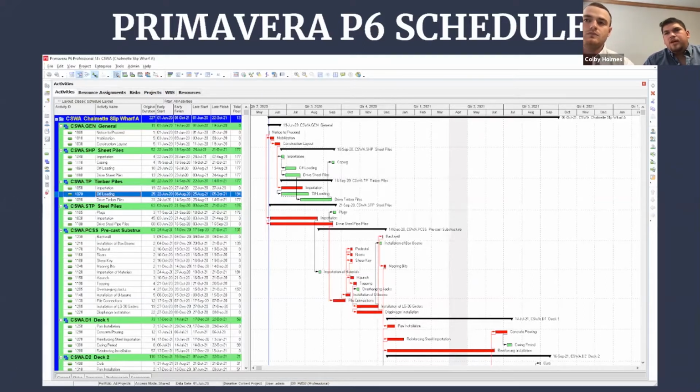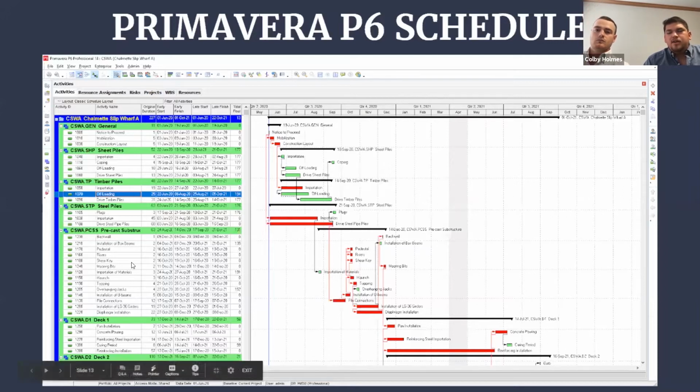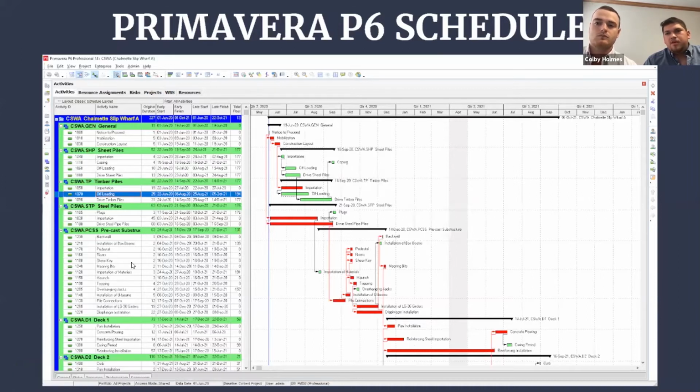Yeah, I mean, we calculated, we optimized space. We calculated to see if we were going to save money, if it was going to be too much. We ended up saving time and money on both, using 4 cranes and getting rid of 3 as soon as we were done. And at the end of the day, they need their wharf back. They need to get it. So it's going to be a little bit. We felt it'd be better with a little bit of a delay.